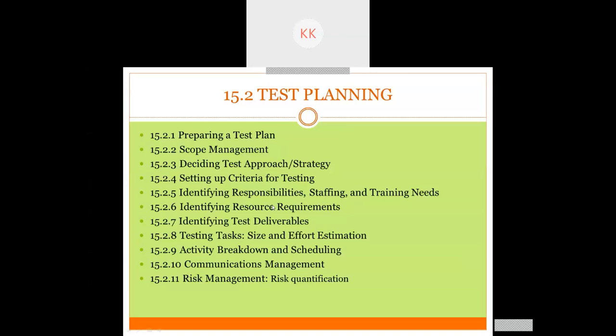Then setting up criteria for testing. As we have seen in the last class, we need to decide entry and exit criteria and suspension criteria for the testing, because testing is an unending process, so we need to stop somewhere. That's why we need criteria for ending the test and criteria for starting the test.